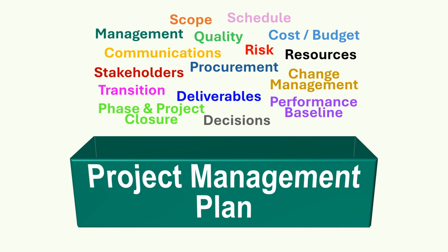Use one of the templates available on the WSDOT Project Management Guide website, depending on the size and complexity of your project. Right-size the PMP to meet the needs of the project and your team. You will touch each of the steps, but some may be minimal effort for smaller projects. The PMP will help you manage the project and measure your team's progress. The PMP is a living document, and you will be responsible for updating it when it is needed. It is your responsibility, as the project manager, to deliver the overall project within scope, on budget, and on schedule.